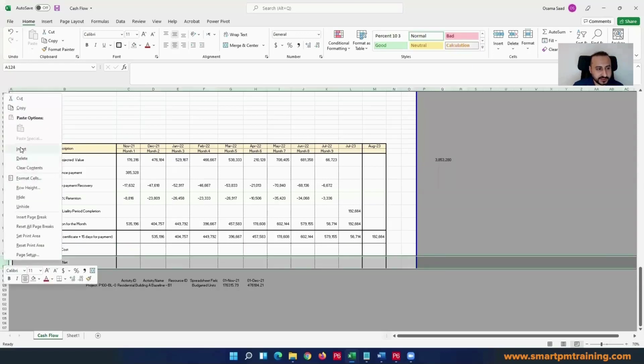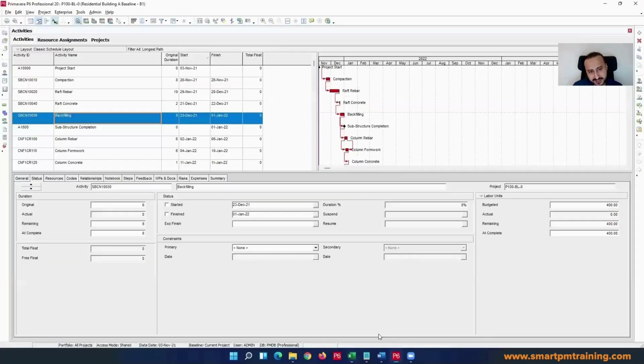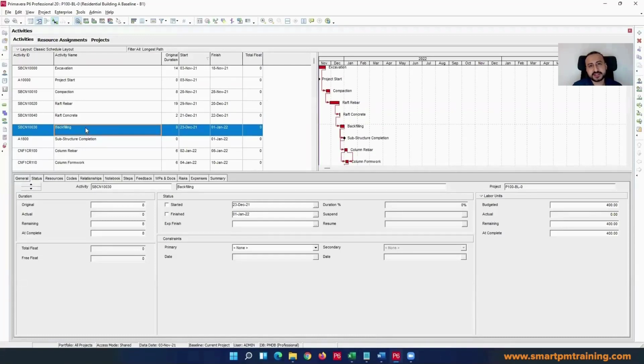And you can have something here. So you can add cost here, but for expensive equipment, you may want to make it separate, for example. Or for expensive equipment, like placing the LPO, you can go to the procurement activity for that material and have your cost assigned on it.